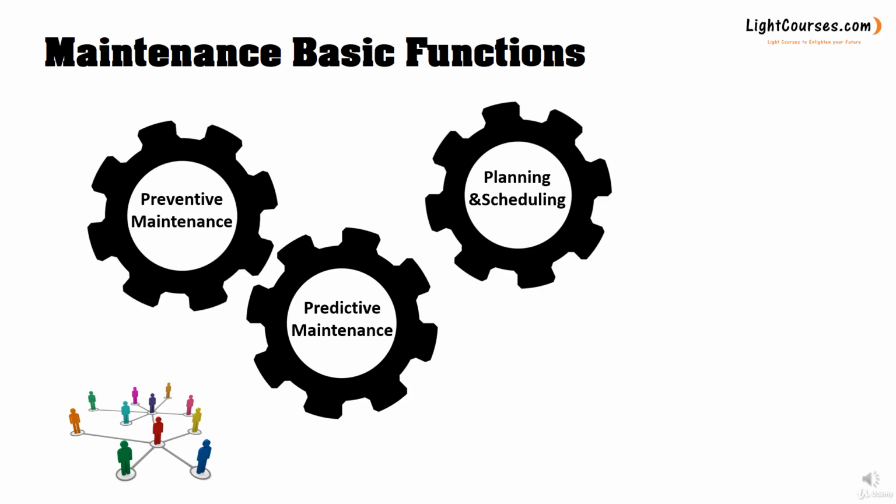And when to do the job is not as simple as you think, guys, because sometimes it needs big cooperation and harmony with the operation team or the production team, who represent your internal customer or the real owner of the equipment, because they are the ones operating the equipment. So you need to organize with the operation team when exactly you can stop the equipment, when exactly you will have the empty slot to execute the maintenance job.